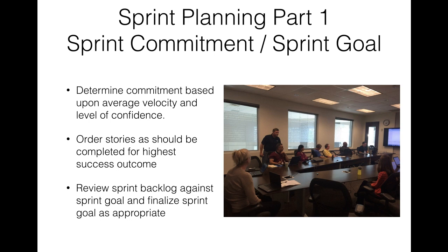Sometimes it's more feasible for a team to juggle higher risk stories to the top, or maybe they need to move bigger stories at the top so they'd be more successful, or make some space in between certain types of stories because of dependencies or because of experiences in the past where they've learned the right order to work stories.